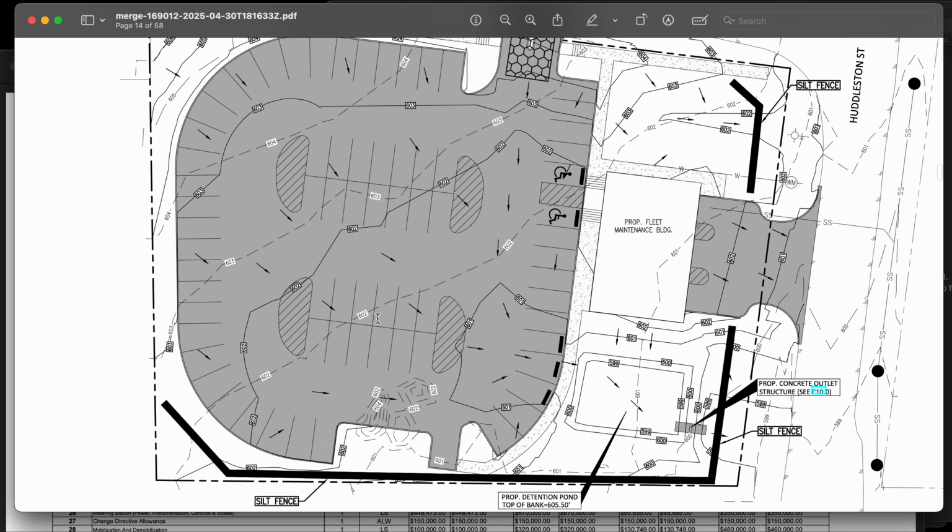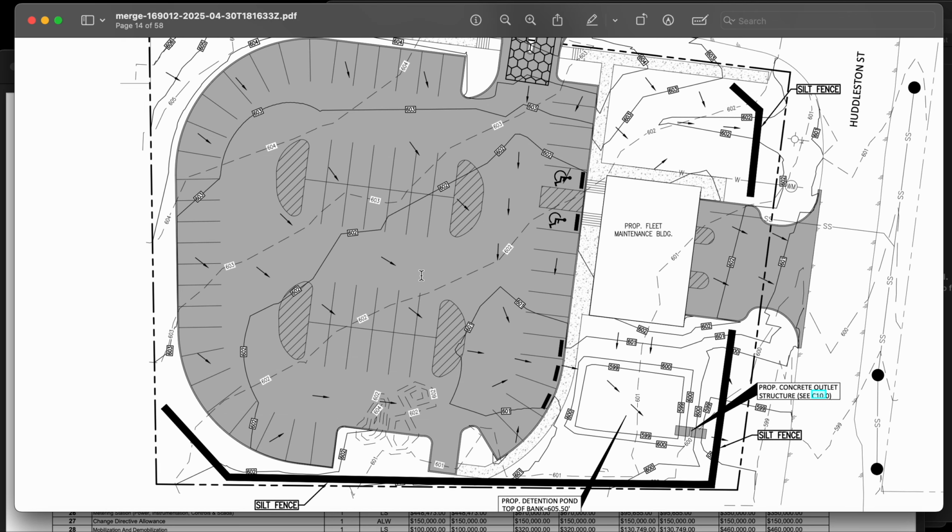Okay, and then also before this, we also like to include the mobilization, which varies for each company depending on their overhead. This is where you want to factor in most of your profit, your margin, all your overhead expenses that you may have. All this goes into your mobilization. And just for a rule of thumb, our mobilization is roughly 5 to 7% of the total price.